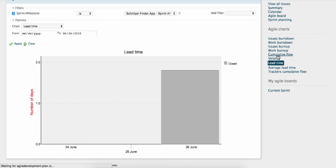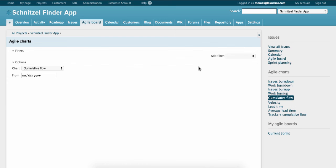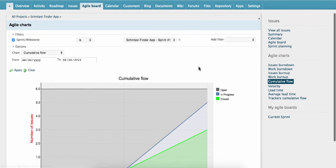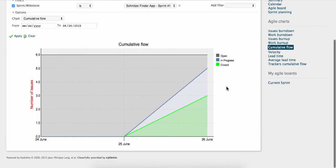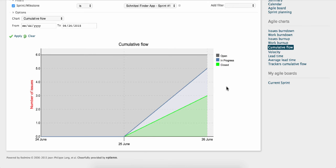Cumulative Flow charts show how issues are flowing through different statuses. This chart helps answer questions such as: are issues reaching a final state? Is there a particular status that's taking a lot of time? How long does it take you to go from an idea to actually providing value to customers? And is the scope of projects changing over time?